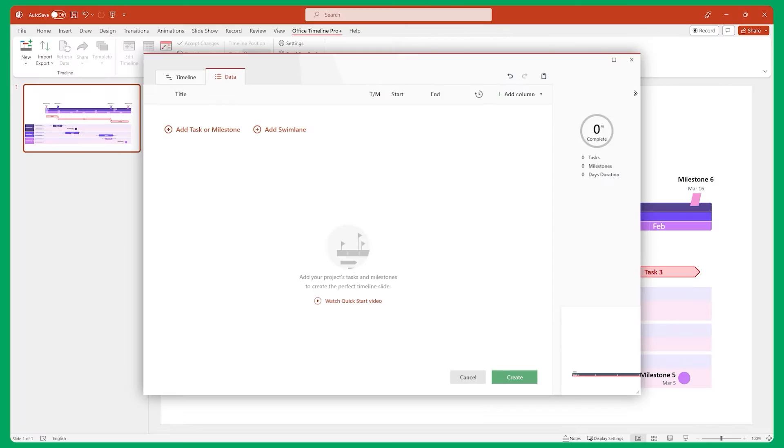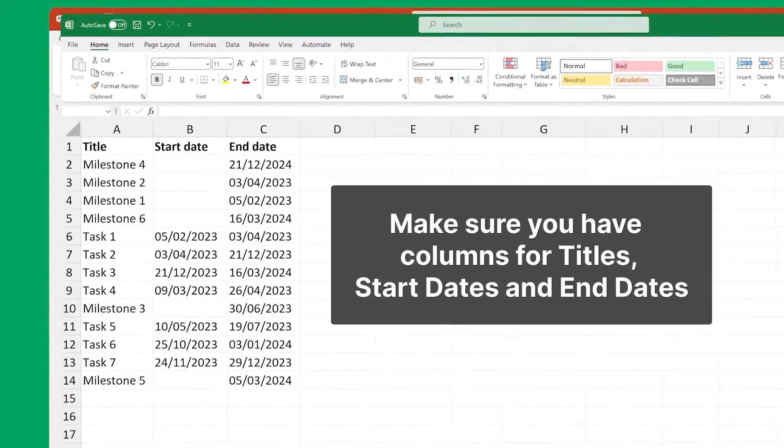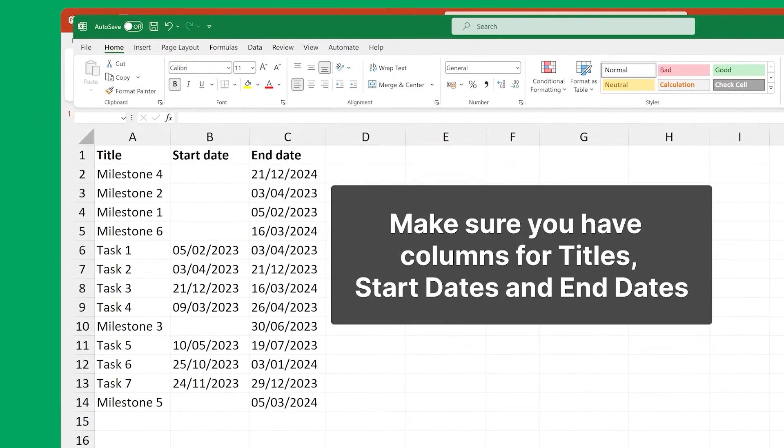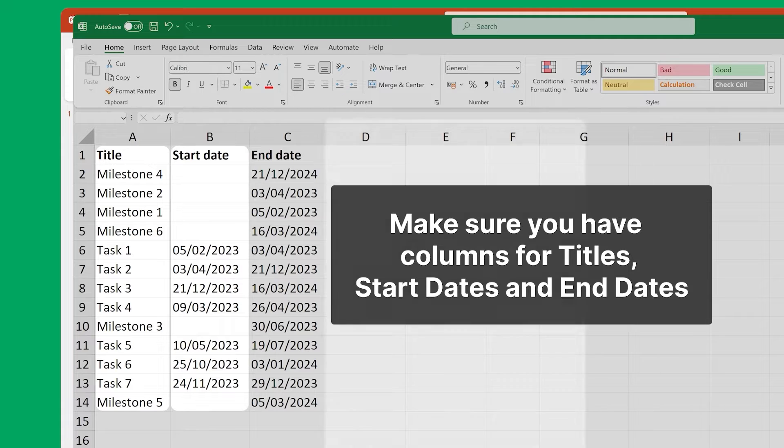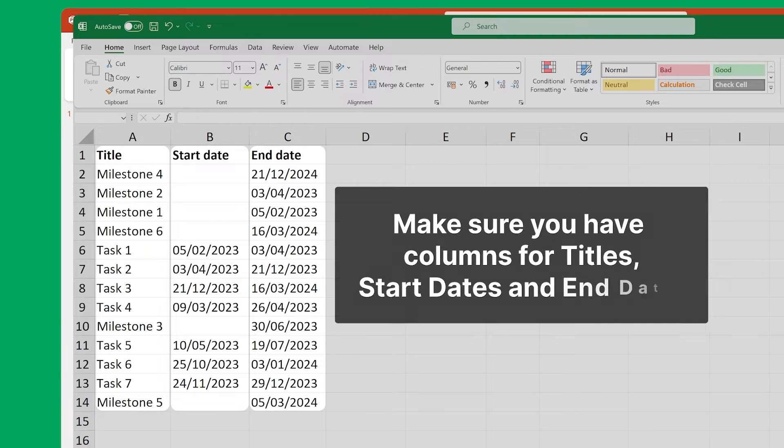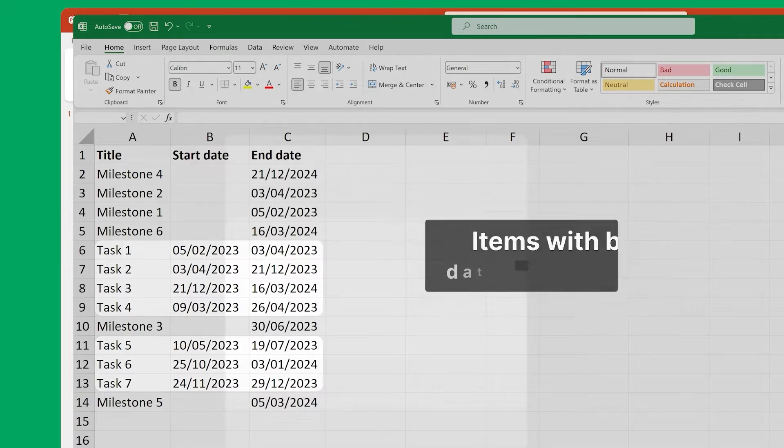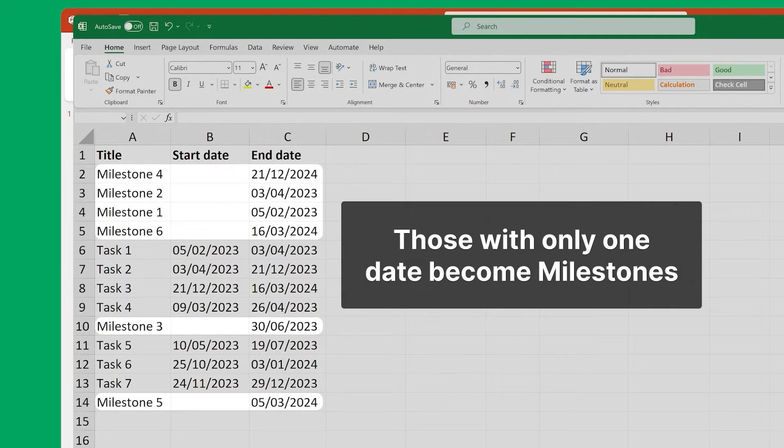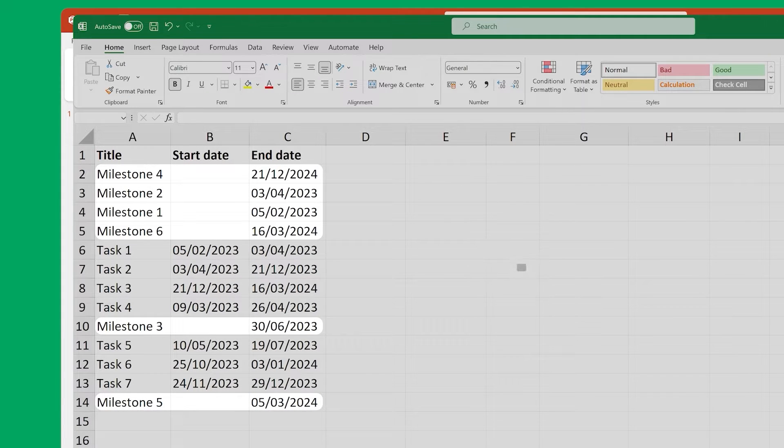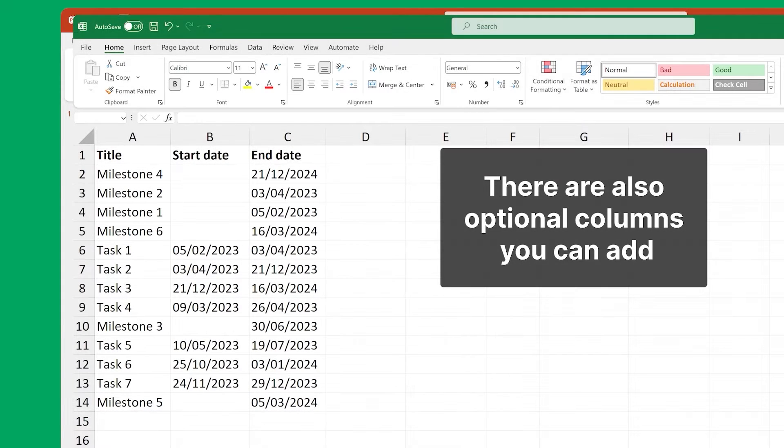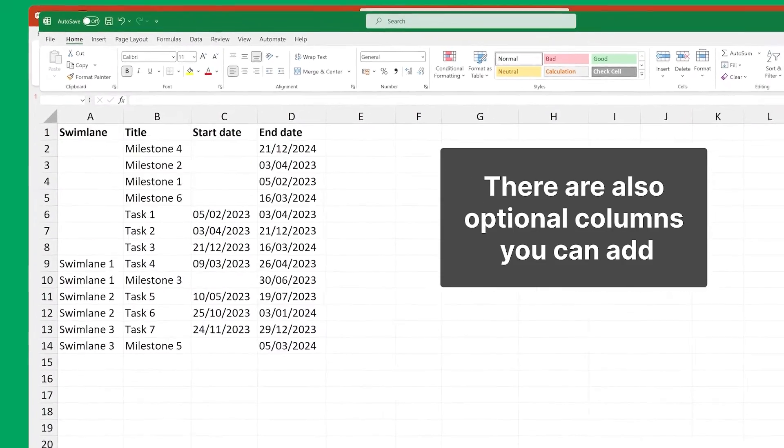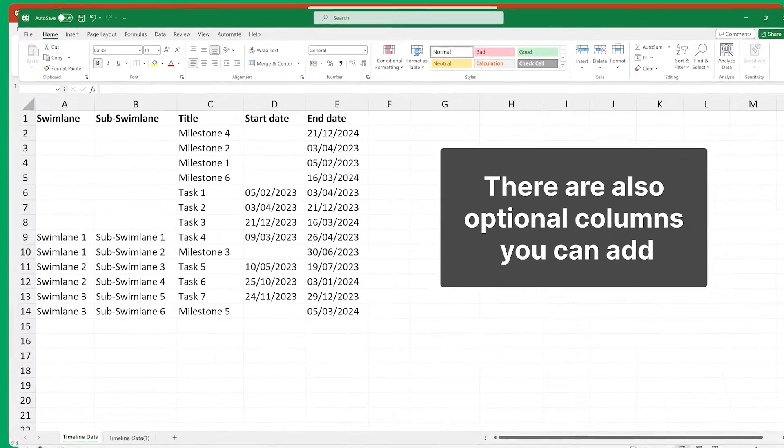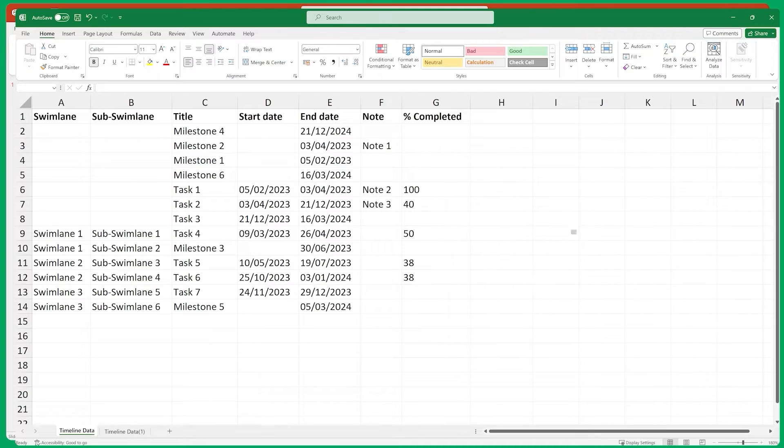All you have to do is to make sure that your Excel sheet has columns for titles, start dates, and end dates. Items with both dates filled in will become tasks, while those with only one date filled in will become milestones. There are also optional columns you can add, such as Swim Lanes, Sub Swim Lanes, Notes, and Percentage Complete.